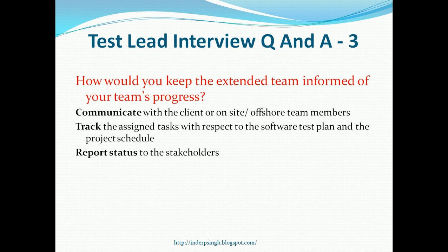So this status report contains data like what is the overall test plan, how is the schedule going, whether the tasks are behind schedule, on schedule or ahead of schedule, if there are any issues being faced by the team, what is their possible resolution, how is the quality of the system looking so far. So all these things appear in the status report, and it is an important means of communication with all the stakeholders in the project.